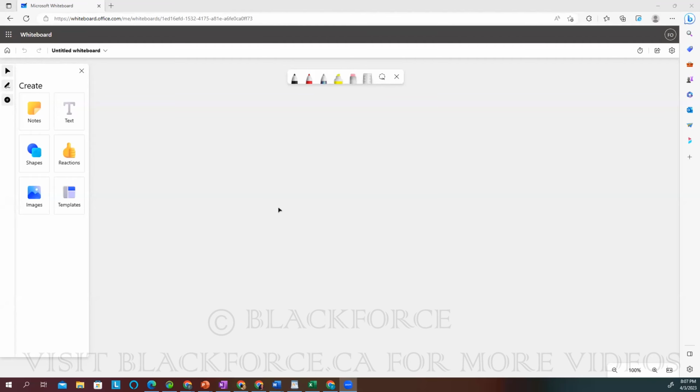Yes. Okay, good. So now let's say we are just starting a new sprint. Let's say we are about to start our sprint. This is a new team. We don't know what our velocity is, right? I said, okay, let's have an agreement. We have about 10 people working on this sprint. So let's say that each one of us can finish 2 story points. At the end of the day, if everyone is finishing 2 story points, we have about 20 story points to work with. So that's our initial velocity, right? So now what the team will do is, for example, let's look at these items.